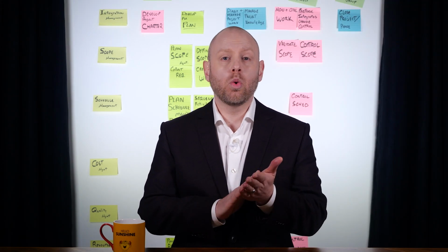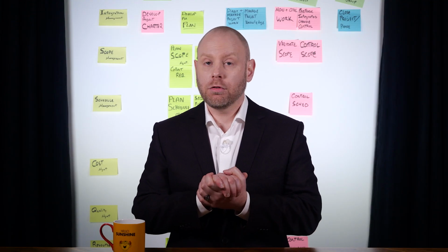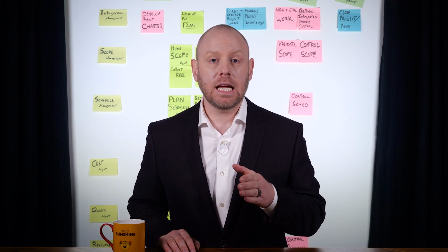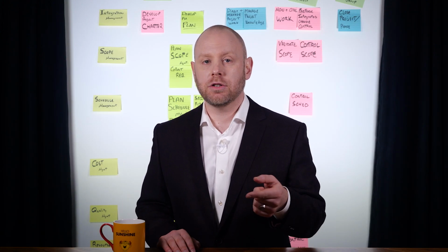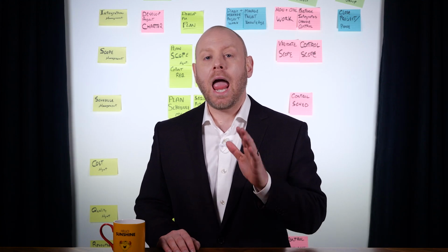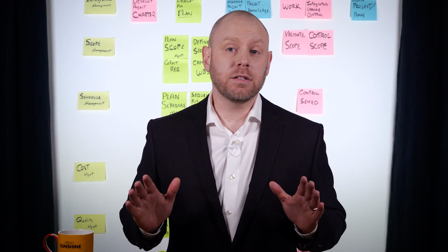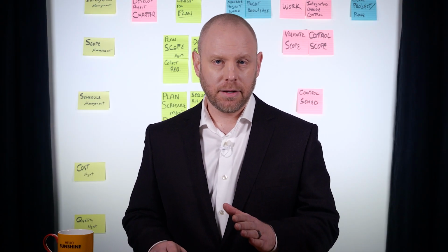Now we're getting into qualitative risk. Our qualitative risk analysis is the process of prioritizing individual project risks for further analysis or action by assessing their probability of occurrence and impact, as well as other characteristics. This can be subjective, as it is based on the perception of risk.